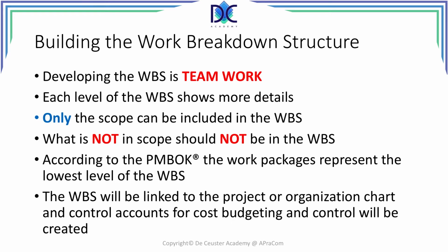What is not included in the scope should not be in the WBS. According to the PMBOK, the work packages are the lowest level of the WBS. And finally, we will link the WBS to the project or organization chart,